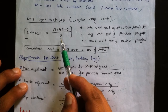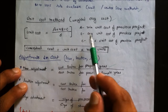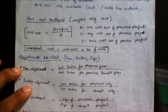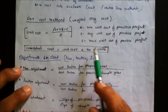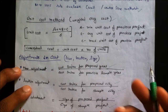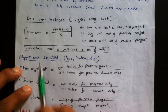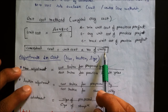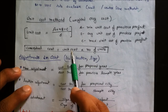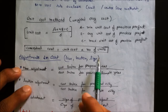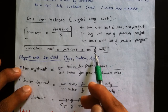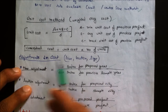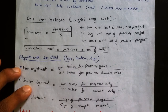As per the numerical approach, the unit cost method is very important. Unit cost = (a + 4b + c) / 6, where a is the minimum unit cost of the previous project, b is the average unit cost, and c is the maximum unit cost. Conceptual cost = unit cost × number of units.